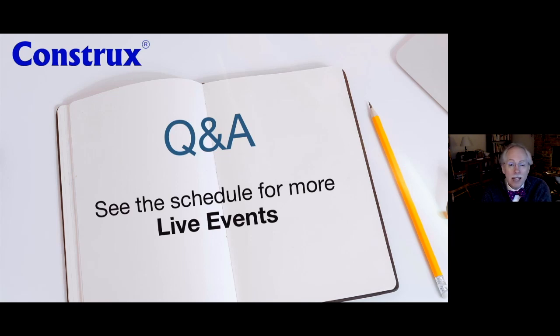then what you're doing is you're asking people to estimate effort directly, trying to come up with planning numbers, or even worse, promise numbers. And really, we need to invoke more rigorous techniques on the teams that take longer to do if you want promise or planning numbers. It's going to take at least some math behind the scenes to do those things. And so to use planning poker as a way to come up with a planning number or a promise number is just not a good practice. You can do that, but you're going to have to do some math and other things to make it work.